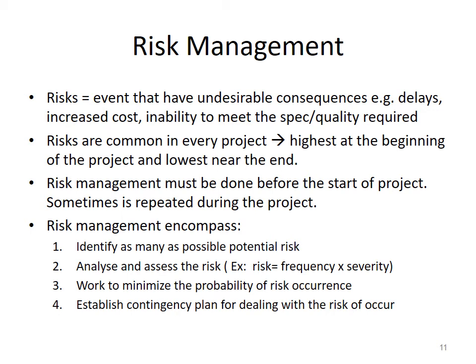So risk management and evaluation must be done before the start of the project. Okay, and sometimes it is repeated during the project from time to time. So what are the processes involved when we try to evaluate risk or manage the risk? First, we will have to identify as many potential risks as possible. Okay, brainstorm, and then we analyze and assess the risk. For example, using the common equation, risk equals frequency times severity.